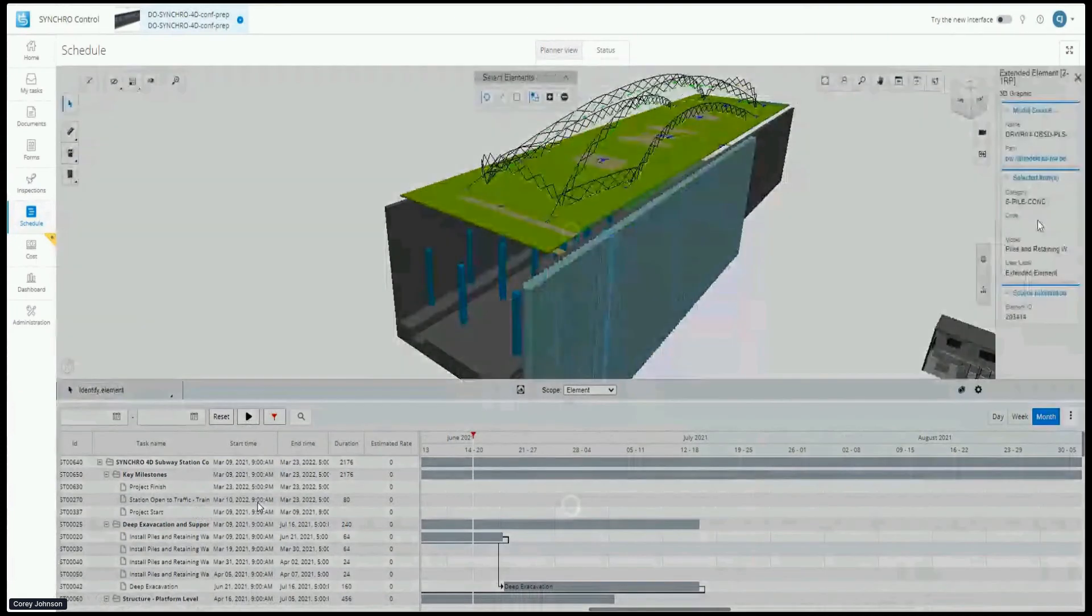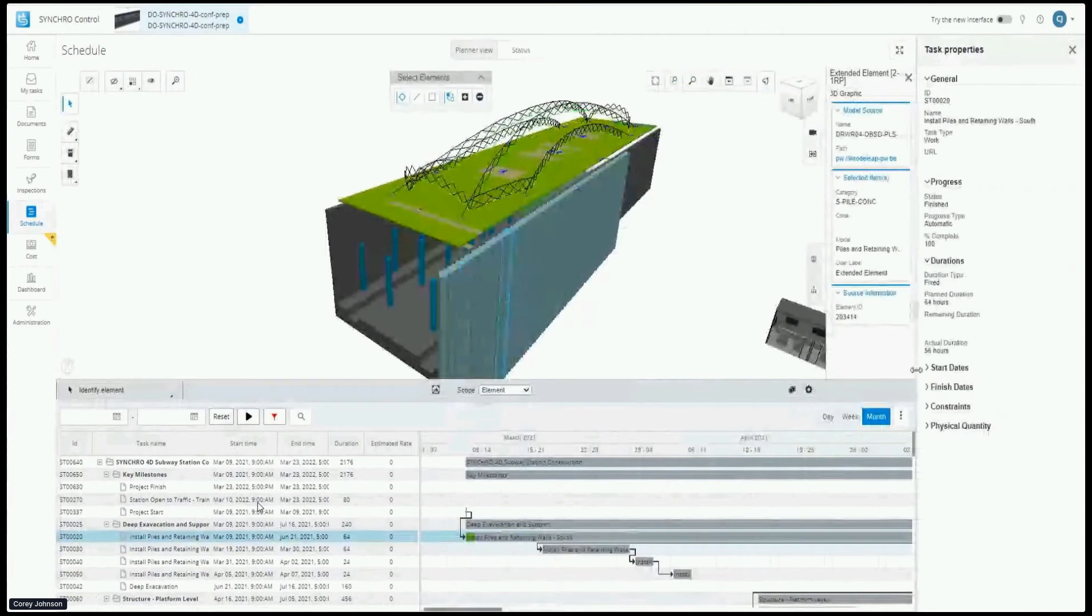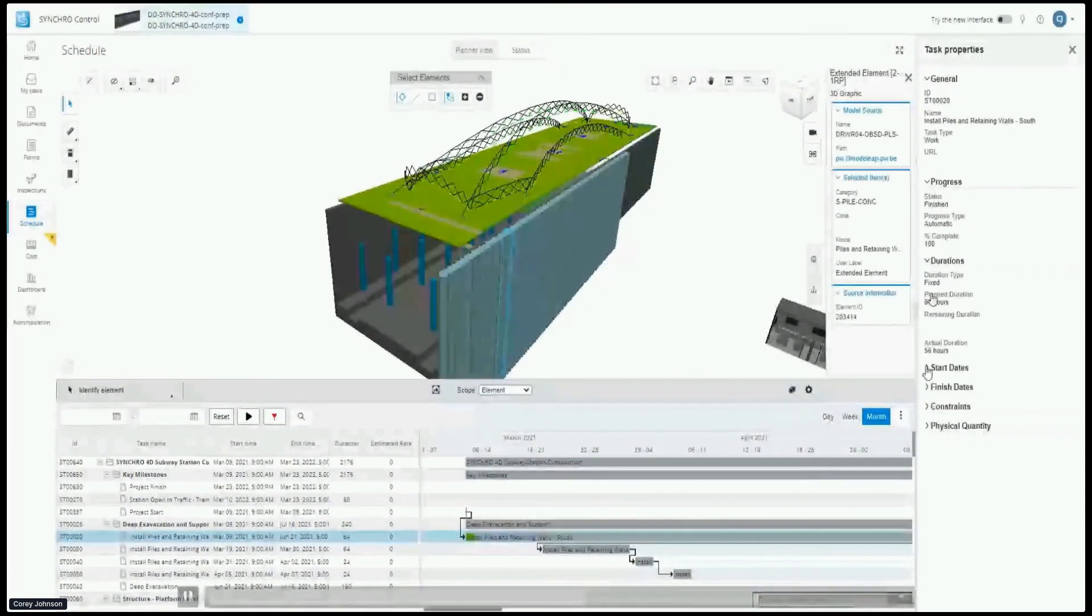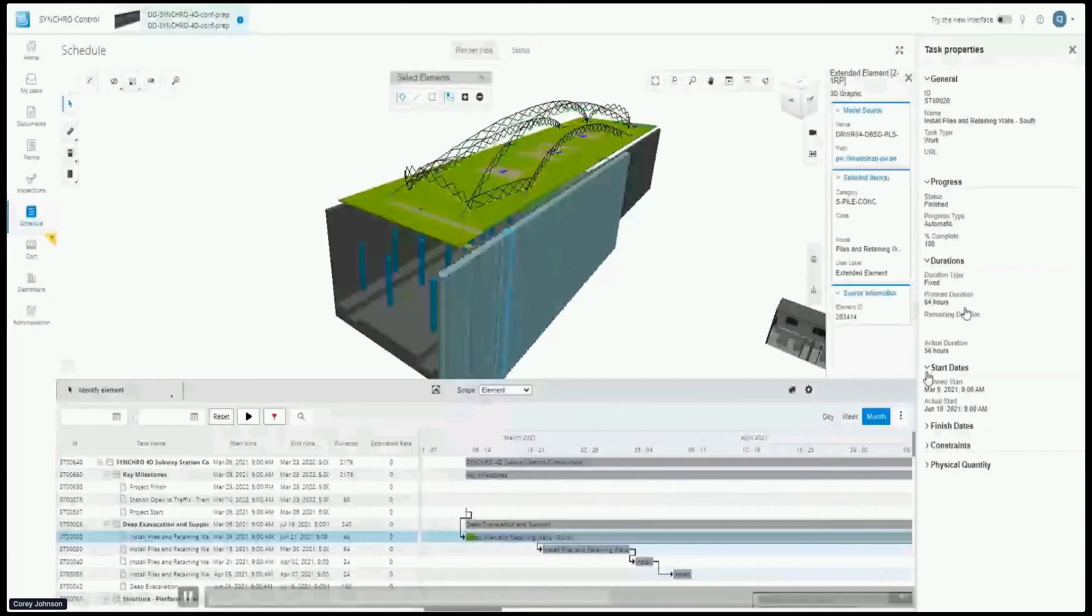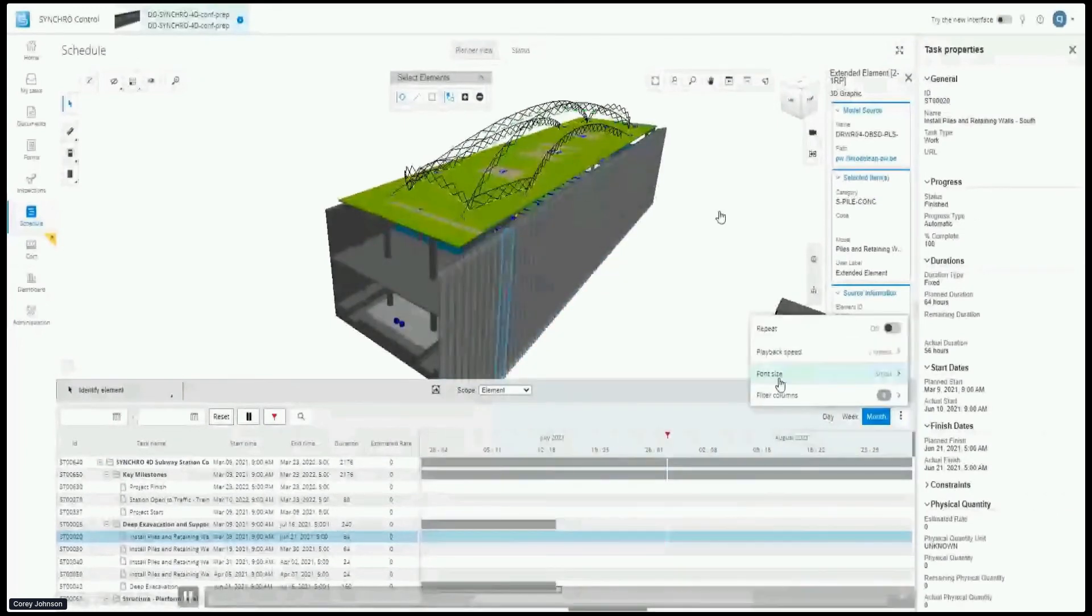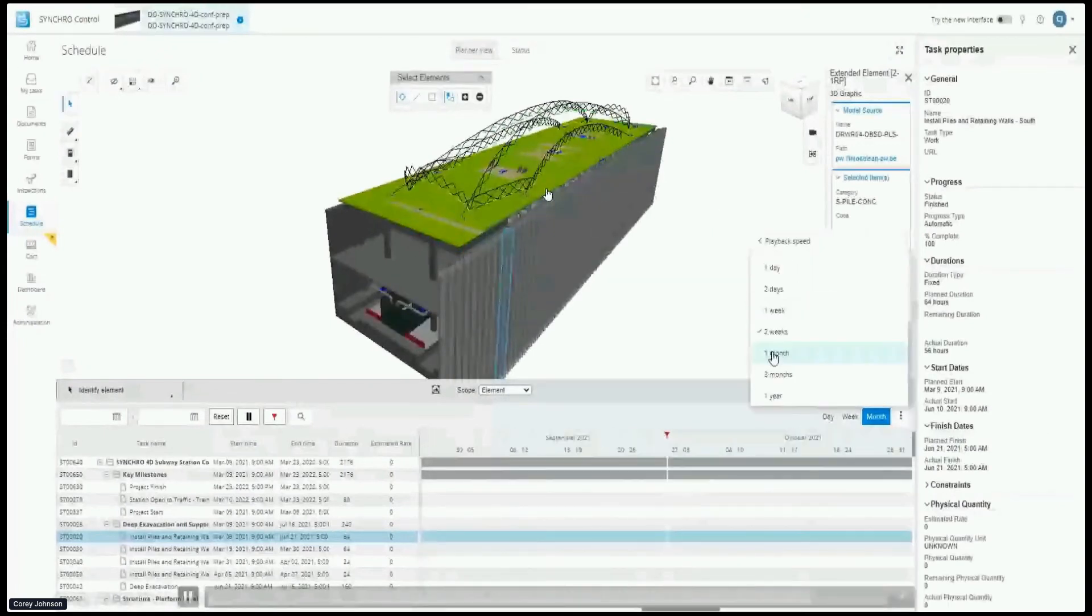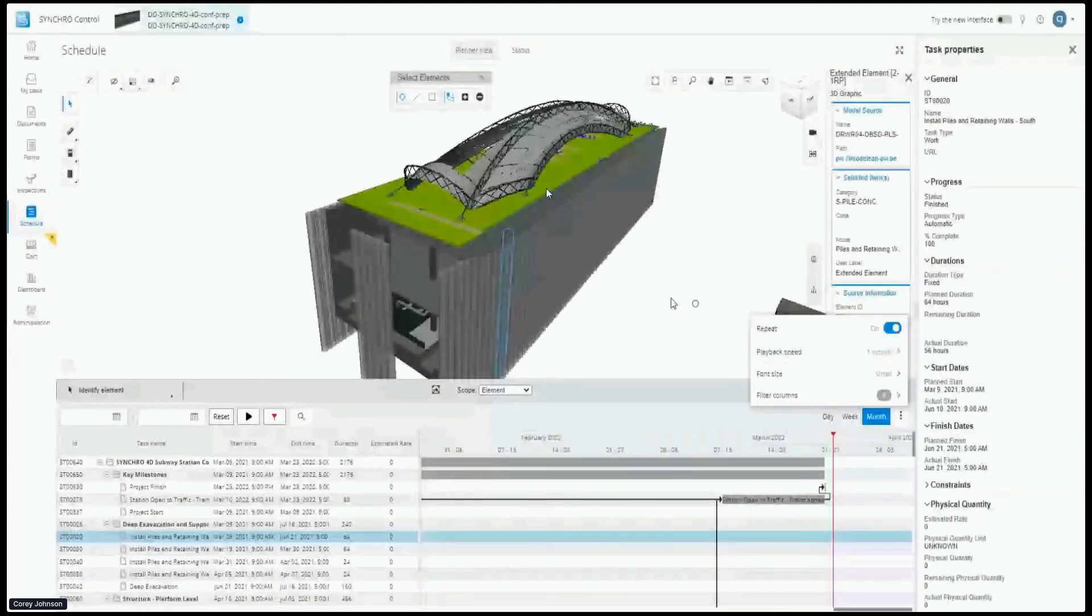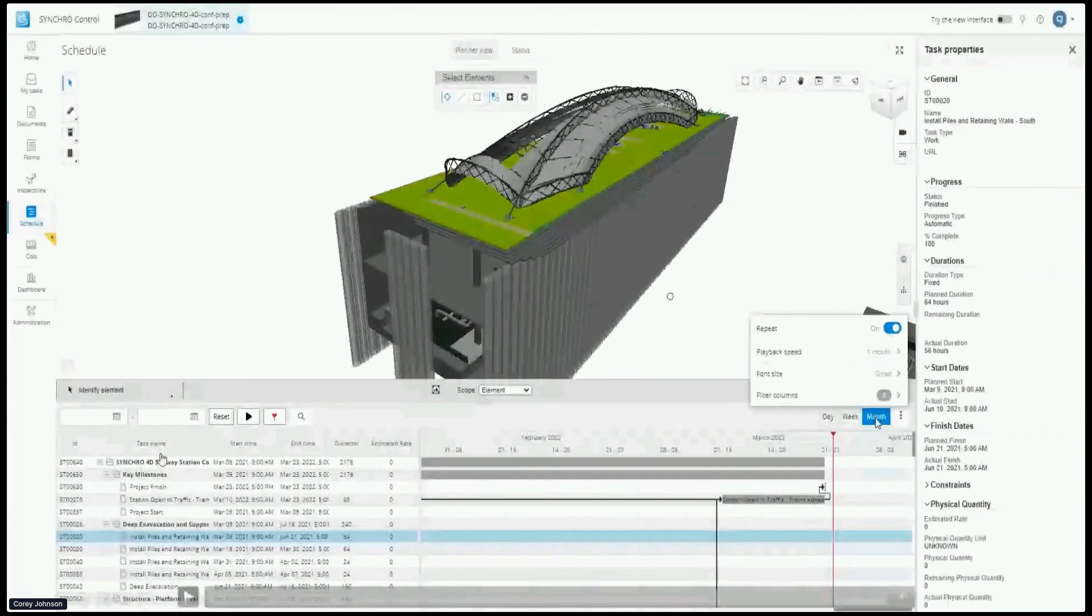Remember we saw those quantities and we set the schedule. Notice the plan duration was 64 hours, actual duration was 58 or 56. The plan start date, actual start date - this is valuable information so that you can track your progress. And everybody on the job site can see where are we at, even the owners getting information in. You have a lot of flexibility.